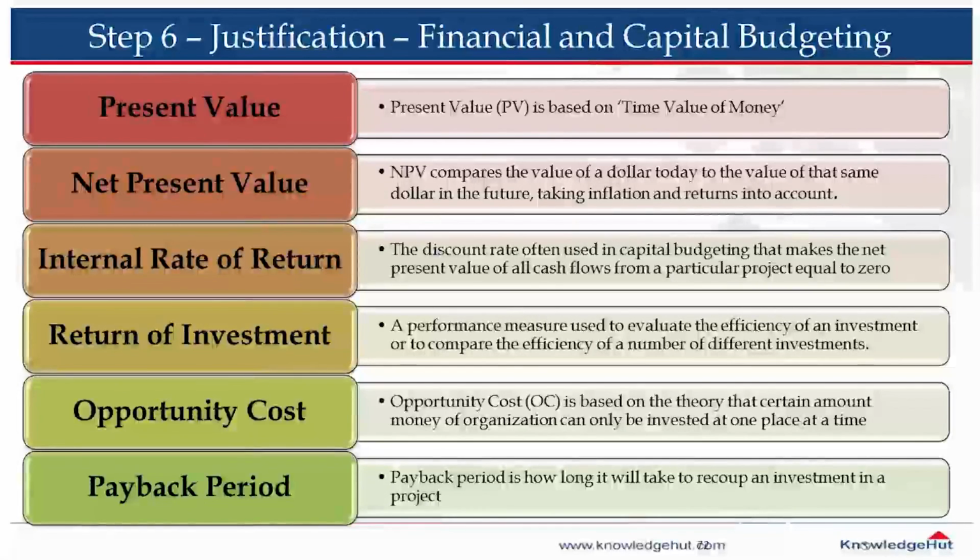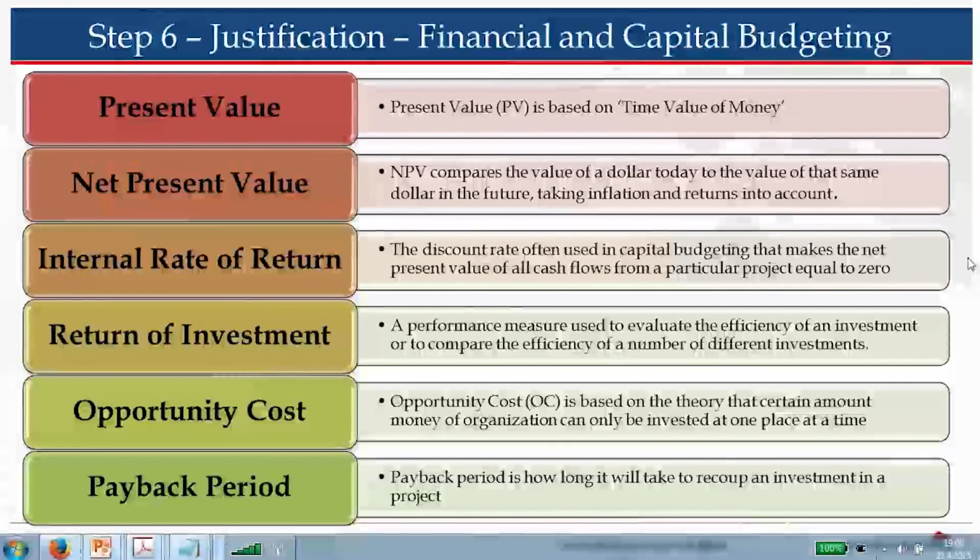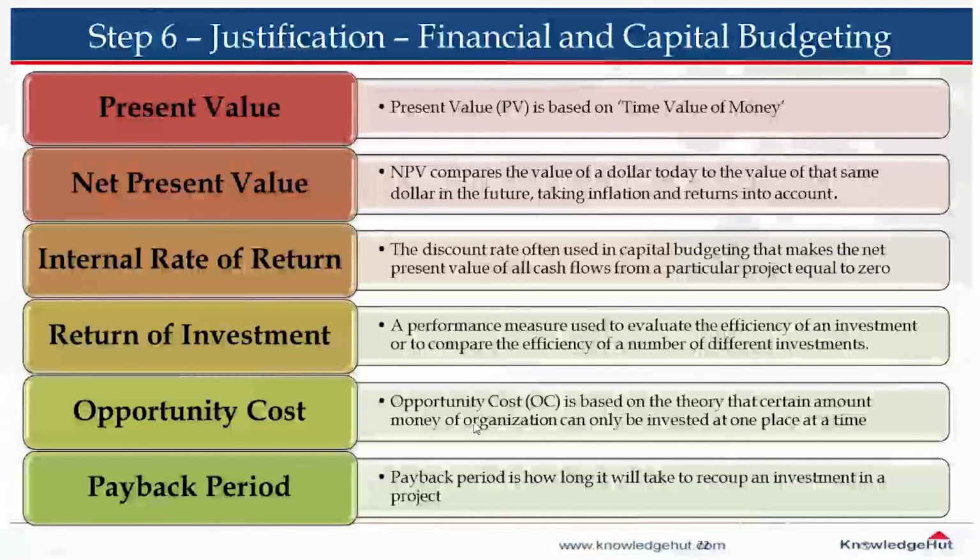When we do project management, when we invest or when we start a project, we clearly see all these, like what is opportunity cost, what is payback period, which says how long it will take to recoup an investment. So if you're investing $200,000 in a project in the first year and you get returns, if you take 2 years to get back whatever you have invested, then that's your payback period. So we will see probably some examples.